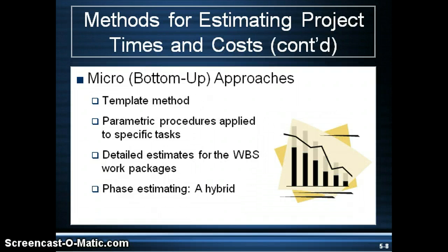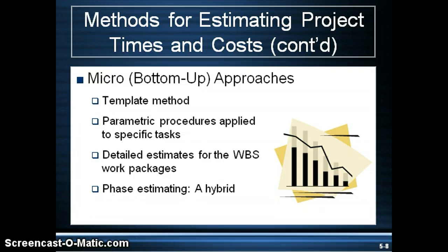Now for the bottom-up type approaches. The template method uses projects similar to past projects as a starting point, noting differences in the new project and adjusting for them. The next is parametric procedures applied to specific tasks: using known data on how much labor is needed to perform a certain task, you can predict what would be needed for the new project. For example, with a software conversion project on 20 computers, knowing the labor needed for one computer allows you to estimate the labor required for all 20.